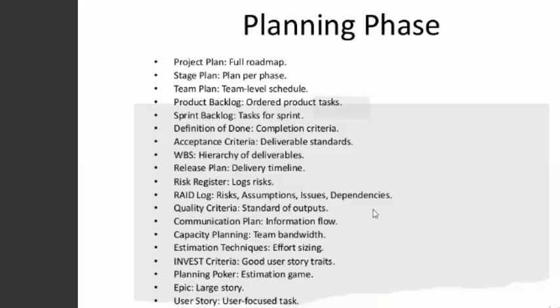Secondly, you don't estimate the effort of a WBS. You don't attach time of delivery to it. You also do not attach a timeline, like, I intend to deliver this work item on XYZ day. No, you don't attach such. But in your sprint backlog, you have timelines.